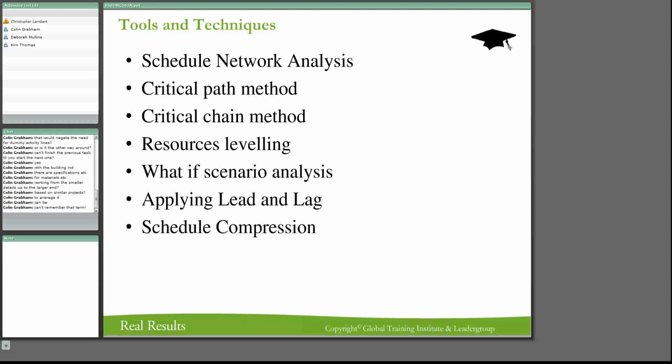The critical path method calculates the theoretical early start and finish dates, and the late start and finish dates of all activities without regard for any resource limitations. All right? Then you're going to calculate and estimate, and mitigate some things by implementing some slack in there. You put some slack in because you know that something could happen. Excessive rain could happen. Someone could be late on one of the activities.